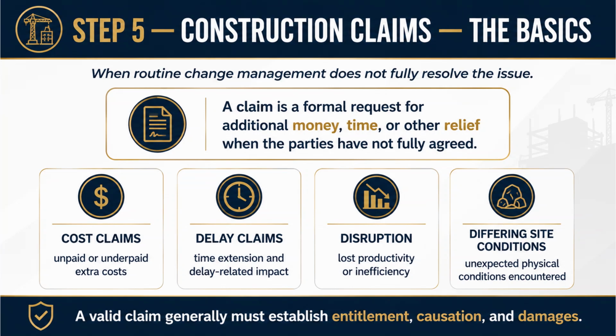What is a claim? A claim is a formal request for additional money, time, or other relief when the parties have not fully agreed. It's what you file when negotiation has stalled and you're formally asserting, you owe me, and here's why. It's more adversarial than a change order. The parties are no longer in agreement, they're in dispute.